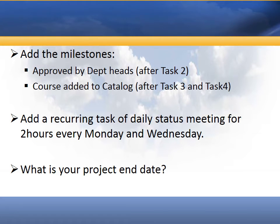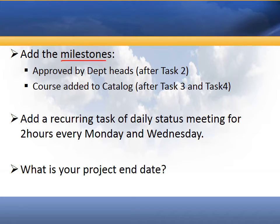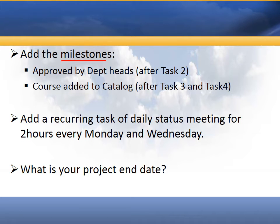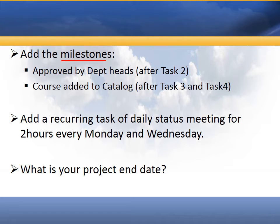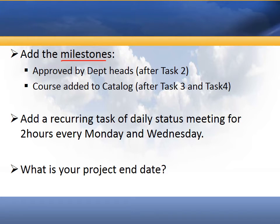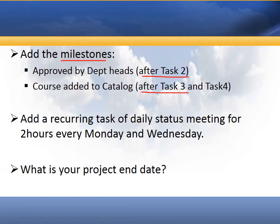Now I've got a few more things I want to do with this project. I want to add some milestones. A milestone is, you can think of it as a task that has a zero length duration. It's something that's important to the project but it doesn't necessarily take a lot of time. So approved by department head, that might just be someone saying yes or nodding their head yes, so it doesn't take a lot of time like hours or days, but it's an important milestone, a step in the project. And then also adding the course to the catalog. We're going to say that these milestones have some dependencies. Approved by department heads can only be done after task two is complete, and adding this to the course catalog should be done after tasks three and four are complete.